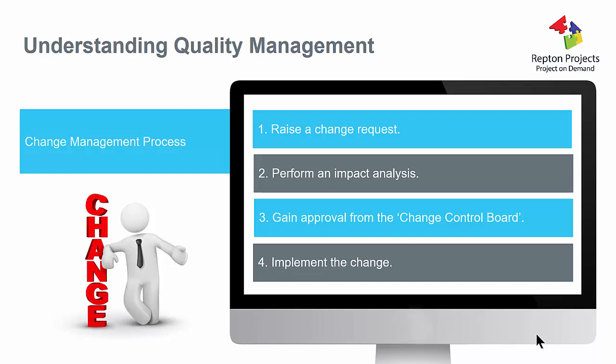When we get the change request, we then analyse this in what's called an impact analysis. And that primarily is concerned with how much extra time is it going to take in order to deliver this change, and also importantly how much extra is it going to cost us in order to deliver this change. So that is the impact on the project in terms of time and cost. Because we might not have the time, or we might not have the money to do this, or we might not want to do it at all.